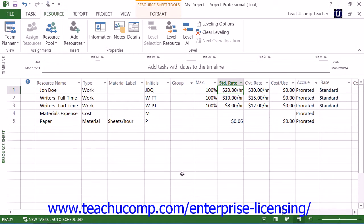The work and material resource types that you've created in the previous lessons in this chapter can have default costs and/or pay rates associated with them. This assists you in recording the costs associated with completing your tasks, helping you keep your project within its financial constraints and improve your future estimates of costs involved with certain tasks.